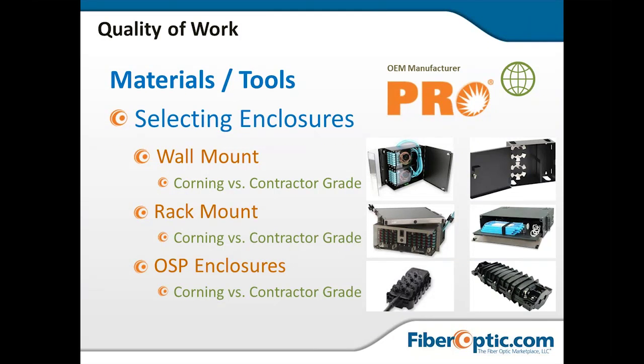Very common in fiber to the home applications, where what the telcos were able to identify was if they gave the teams cables of high quality, predetermined length, they can hide the slack or manage the slack better than trying to pull it off a spool, terminate it, splice it, polish it, whatever they had to do in the field.